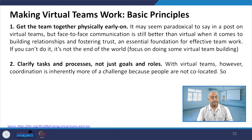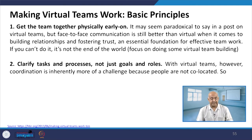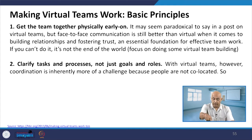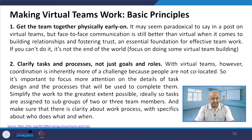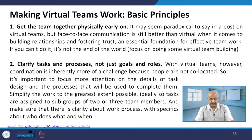Making virtual teams work — basic principles: get the team together physically early on to build relationships and foster trust. Clarify tasks and processes, not just goals and roles. With virtual teams, coordination is inherently more of a challenge because people are not co-located, so it is important to focus more attention on the details of task design and the processes that will be used to complete them — not just defining goals but understanding how they will actually be implemented.